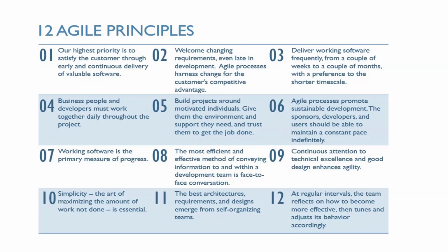Most of the artifacts, like burndown charts and progress reports, will be done by the Scrum Master. The backlog and the high-level work breakdown structure, the high-level work that needs to be done, will be done by the product owner and Scrum Master together. So every role has their own documentation responsibilities.